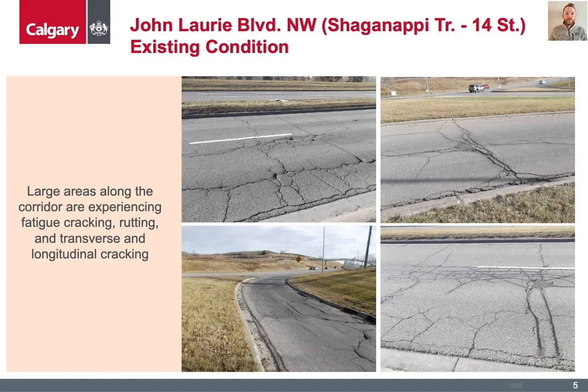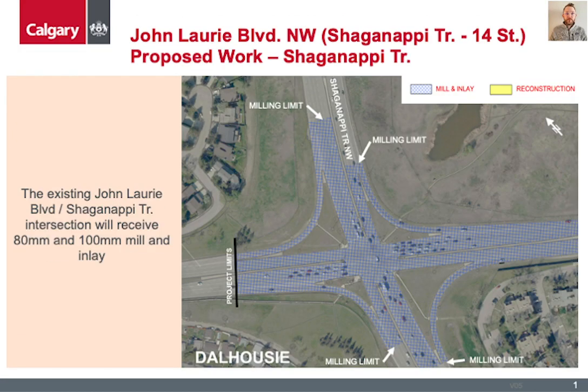Further, the underlying soil conditions at the Brisewa Drive intersection is resulting in frost heaving of the existing pavement. It is for these reasons that this section of John Lurie Boulevard is being rehabbed as part of this project. At the Shaganapy Trail and John Lurie Boulevard intersection, the existing pavement will receive mill and inlay of 80 to 100 mm in depth to the limits shown on the image, north, south and west of the intersection. This milling will help repair both cracking and rutting in the existing pavement.